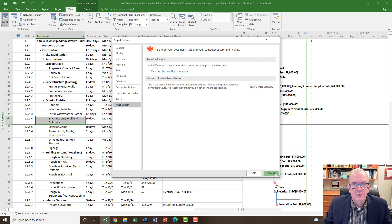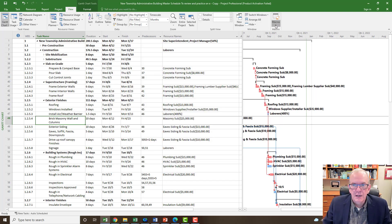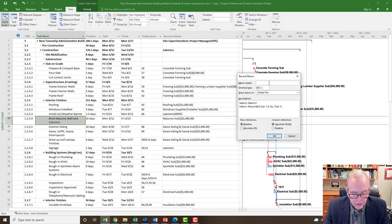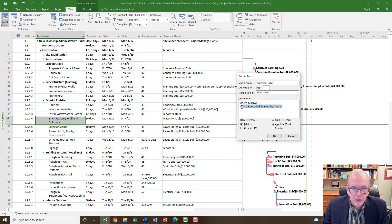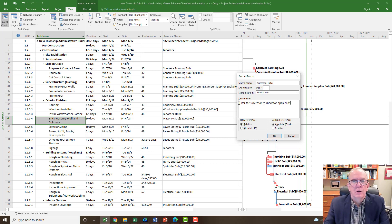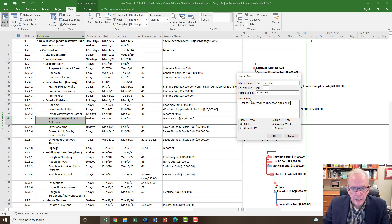I'm going to click Cancel and go back to the Macros tab and click on Record Macro. Let's make a recording of one that I think is pretty useful — I'm going to call it the Successor Filter. We can also put a description, so I'll call it 'filtering for successors to check for open ends.' That's what I talk about in some of my earlier videos when setting up your critical path.